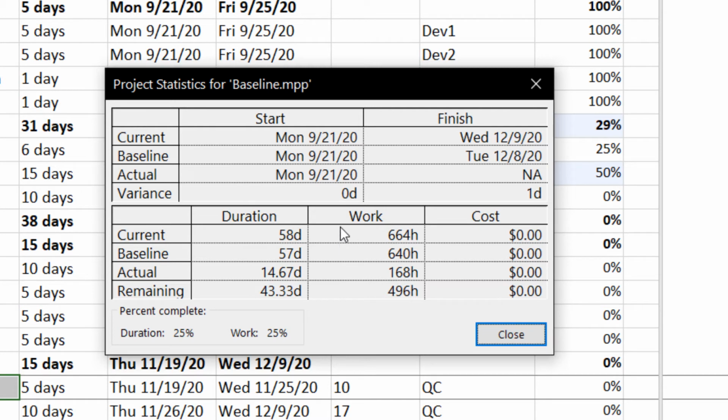And the current means the expectation as of the current date. So, for example, when you are running your project and today, based on the plan, you have to finish your project at around 50%. But for now you have just finished around 40%. That means your project is behind schedule and you need to finish one more 10% in order to bring your project back on track.